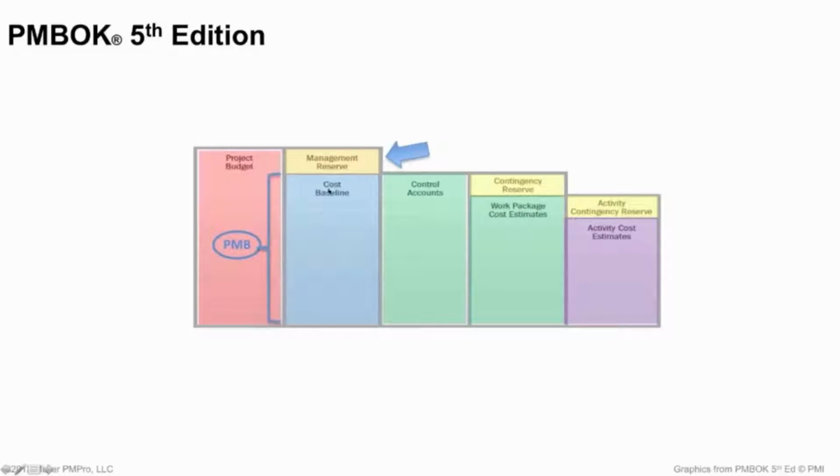Just to reinforce the fact, which should have been clear anyway, the cost baseline is your performance management baseline that we do our forecasting against. We don't forecast against management reserves. So let's make sure that's clear. Okay, if not, listen to this again, but we're all good with that now, so let's move on.